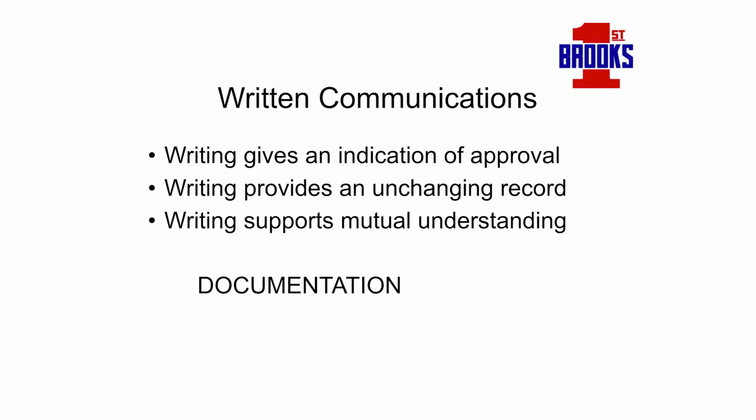Third type, written communications. Honestly, this is probably one of the best ways to communicate just because there's written documentation. You can always go back and look at it. Change orders give indication of approval. It doesn't change once it's on paper. You always have it. Everybody's got it. It also supports a mutual understanding. Can't stress this enough. I had a job one time, believe it or not, I had 3 different project supervisors and 2 different area engineers over the course of a 2.5-year project. So it was very important on that job that everything was documented and in writing so I could pass it along from one to another.